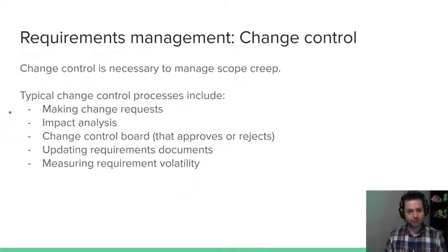Depending on how big of a change it is, you may have to go through a committee or a change control board or your project manager. It just depends on how invasive the change is. And then you have to go through your updates and make sure that you haven't impacted other requirements. I'll probably talk about this later on. There's something called feature interaction, which is a big problem for projects where you have one component, and then you have another one, and through some weird interaction, they impact each other.